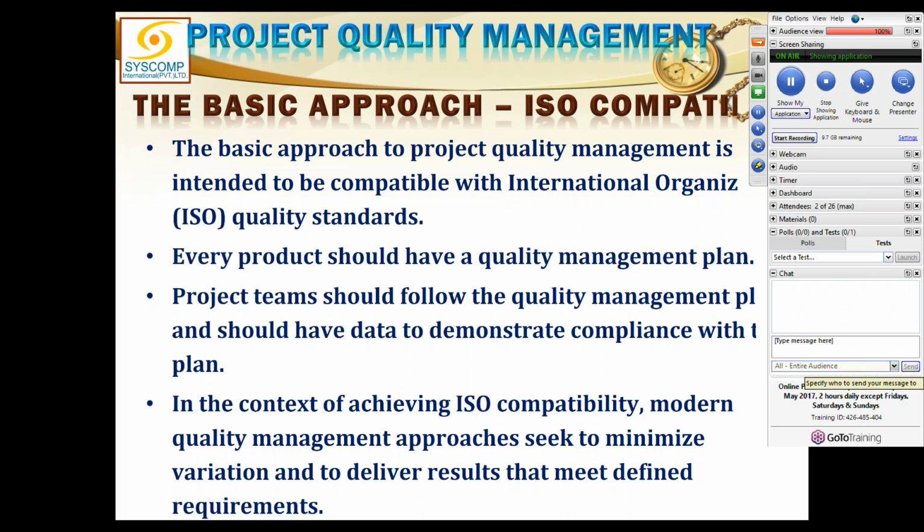Okay, sir. But then quality could have more than one specification. Of course, every functional requirement will have a quality requirement attached to it. It should, because if it doesn't, the customer is usually unable to define that. Customer just says, I want a football with this much diameter, this much psi, this color, and so on. All he is defining is functional requirement. Now it is the responsibility of the project manager to clarify how much is acceptable to him.